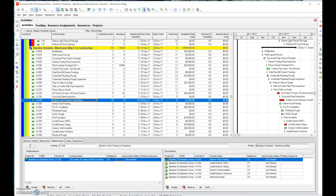You'll have to look at each activity and determine if we have more than one or two predecessors or successors, and that will tell you whether you have any redundancies in the system. Now this takes time.